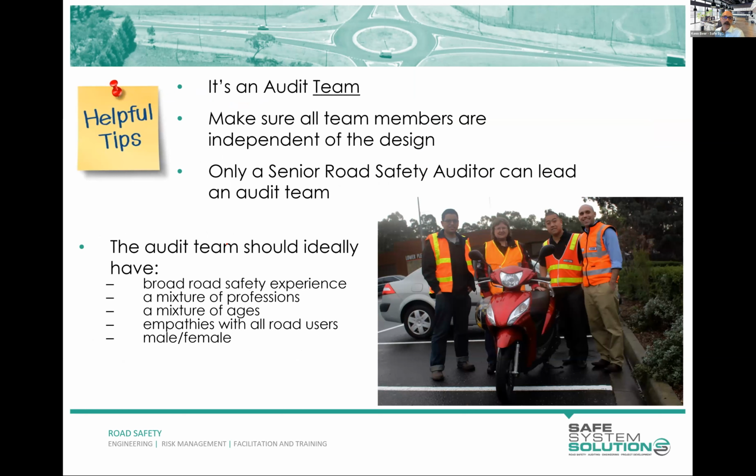So it should be an audit team. Austroads stresses that everything should be done as a team. There is some provision for potentially a one-person audit for a very small job and low risk under the client's direction, but common practice, and if it says to conform with Austroads' guide, you're going to do it as a team, which means more than one person. Make sure everybody's independent. And only a senior road safety auditor can be the lead of the team.